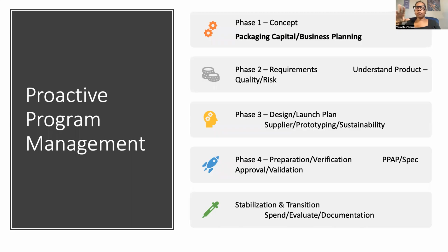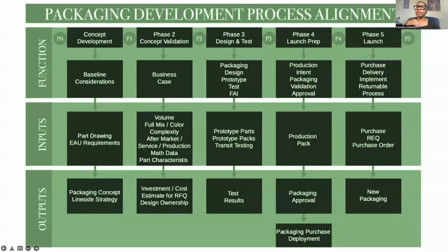And then you'd have to work on blending that in, transitioning to that pack. If you need to rework existing packaging, you have to come up with a plan on how to do that without interrupting production. So something similar to that rack process that we talked about in lecture 4 on how they're building so many racks. So not so many that they're flooding the building and they can't fit in the building, but they're making enough and within a certain time period to keep production running and keep the supply chain full of the packaging.